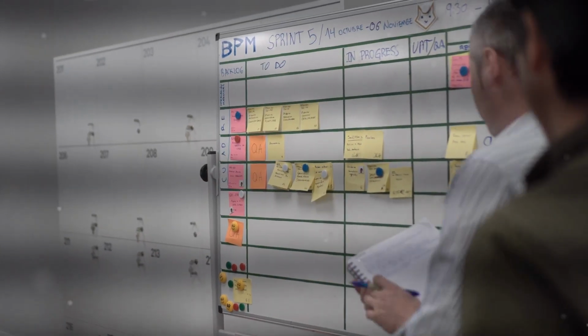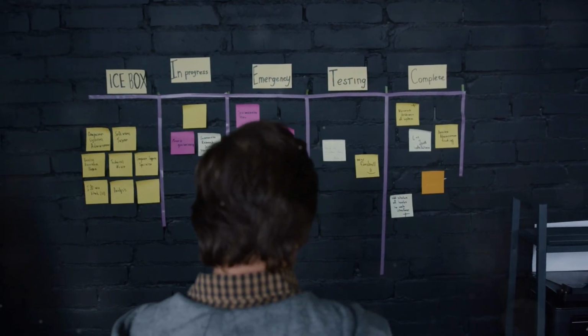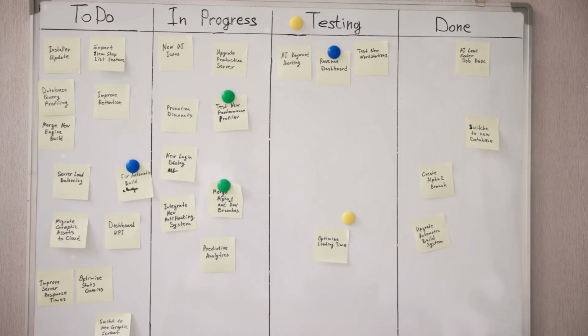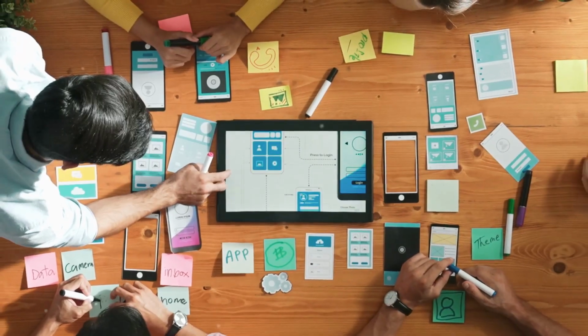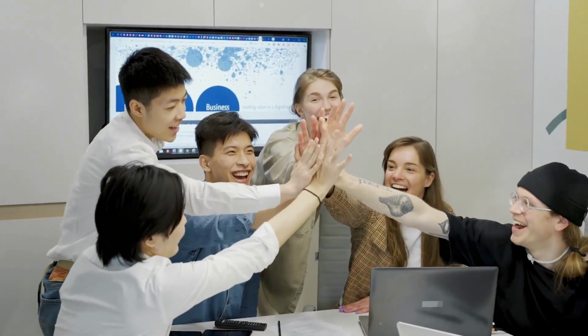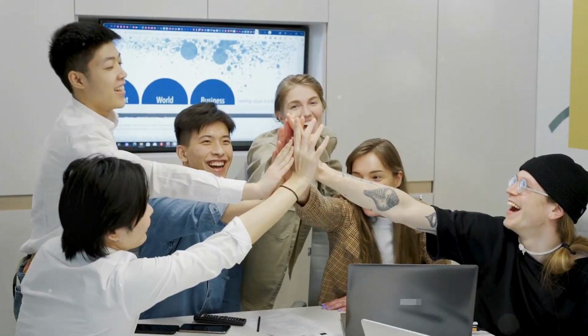When questions are documented, teams can decide which ones must be answered before development starts and which can be resolved later. This supports better sprint planning and reduces the risk of blocking progress mid-build due to missing information.